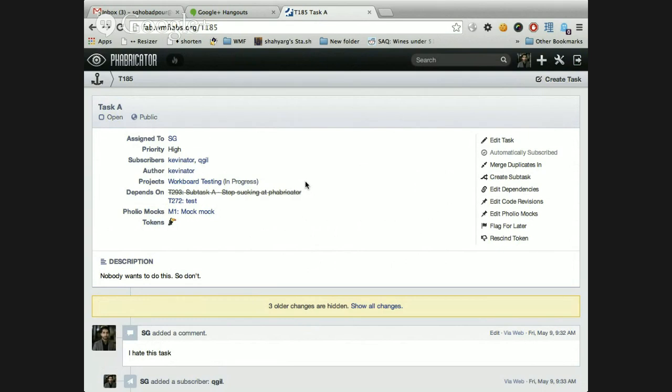Well, the way that we do it on the mobile web team is that for every iteration we have a board, and it's really nice because then you can go back and look at past iterations and see what was complete in that iteration. Plus, it gives us the opportunity to start planning for the next iteration, but also in a board state. So that's wonderful, especially if you have different levels of statuses for cards. You have a card that is just a brainstorm that needs a deeper look before it's ready for development, for instance. At least that's how we do it. So for us, having multiple boards is actually really valuable.